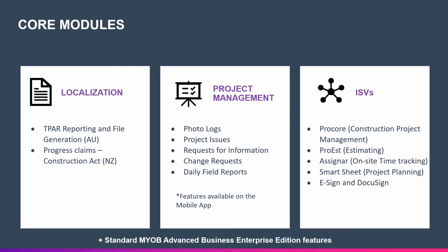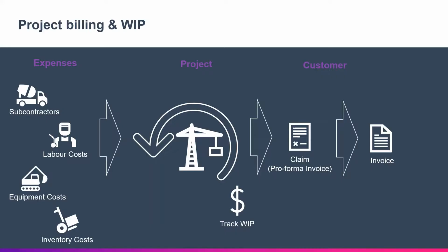Now that we've understood what the features are, let's go into the detail of each. As we've discussed, the primary function of the construction module is to manage the finances of a project. What the module allows you is to keep track of all the expenses from your own labor, your subcontractors, your use of equipment, and even inventory. As you then progress with the project, you will be able to track them against the budgets that you've set and recognize them as part of your work in progress.